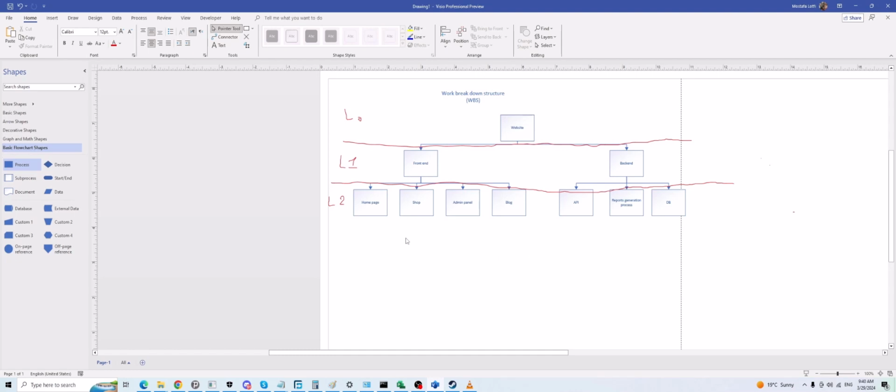How do you identify tasks here, for each work package, at the lowest level? You need to use different techniques like brainstorming, checking similar projects, asking the expert in that field, different methods. You need to identify all the tasks that you need to complete to make sure that the homepage for your project is ready. You have to do it for each work package separately.